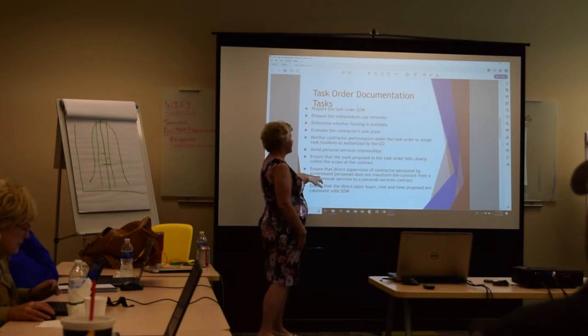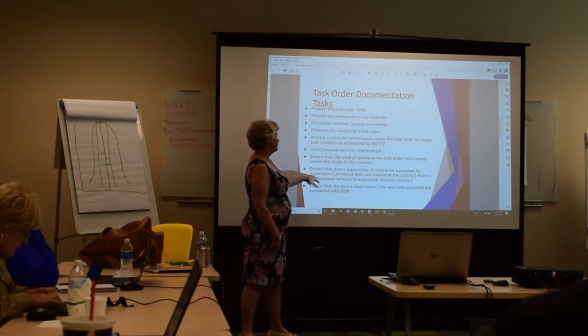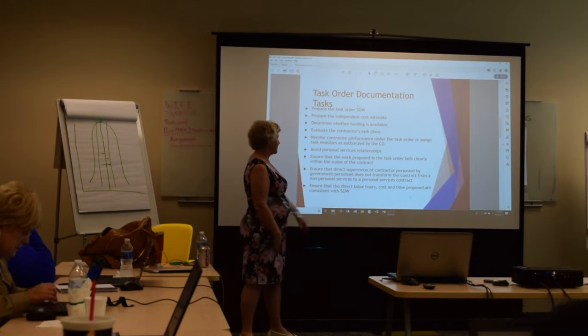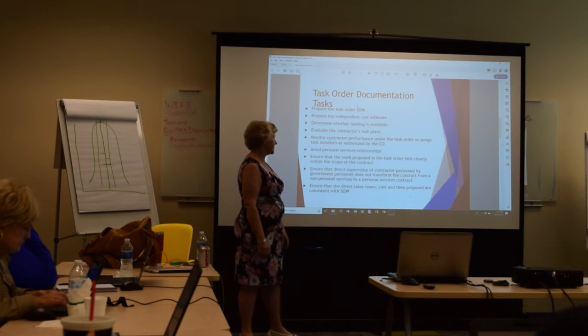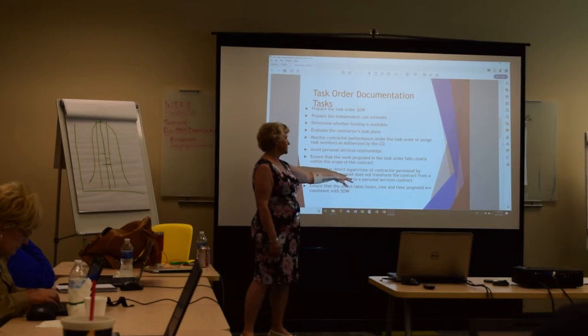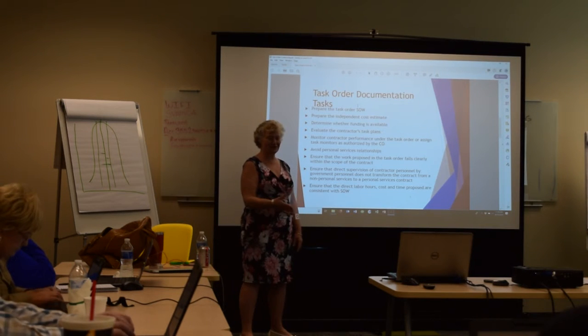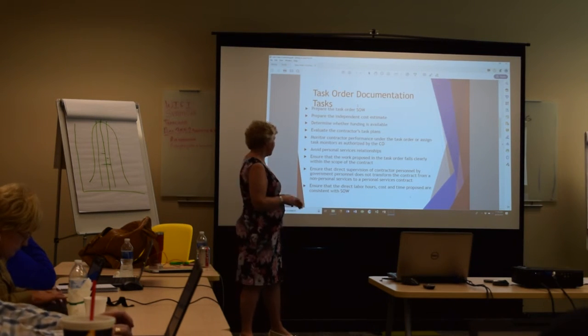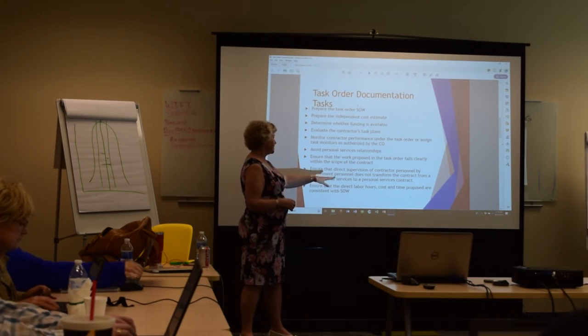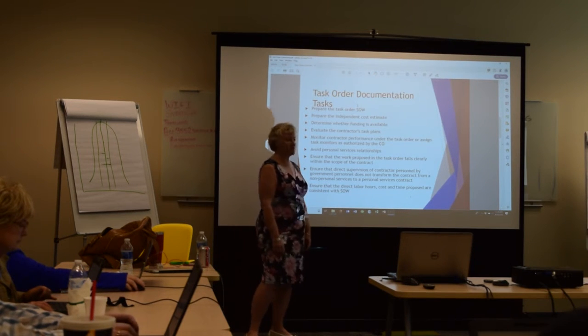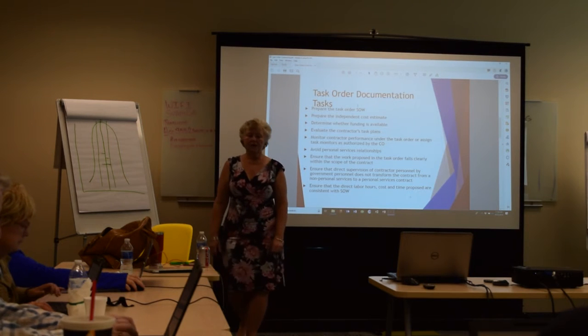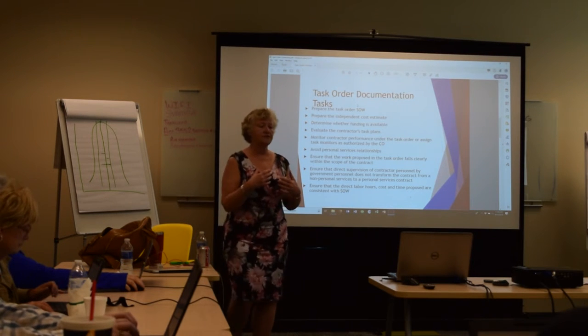Ensure that direct supervision of the contractor personnel by government personnel does not transform the contract from a non-personal services contract with personnel to a personal services contract. The example I just used. Ensure the direct labor hours, cost, and time proposed is consistent with the statement of work. So you want to make sure that you're using the correct labor categories.